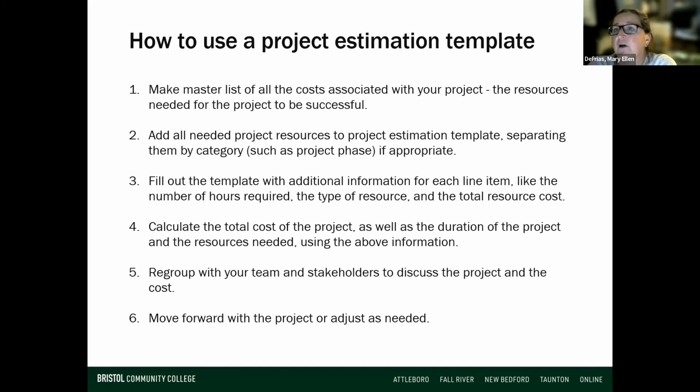So we'll meet with our engineering team 3 or 4 times, and I'll use their project estimation template as a checklist for where we are within the project. Okay, this is what they said they were gonna do. This is what they ballparked it was gonna be. I just got the bill. It was actually a little bit less, so I'm a little bit ahead on my budget, and they're a little bit below where they thought it was gonna be.